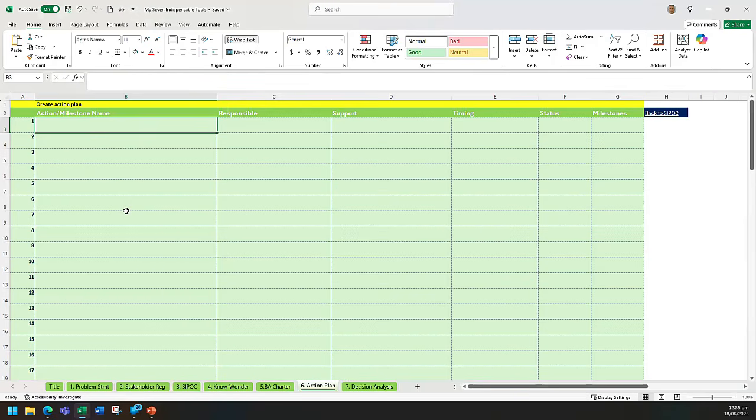And then if you nail that for every piece of work within your project, and get it down onto something like this and track it, then you're chasing people, you're closing loops, which is another thing, closing the loop. A project manager told me years ago, "Greg, has someone such and such done that?" "Yeah, no, they said they were going to do it." And he says, "No, that's not what I asked you. Have they done it? Close the loop." And I rang them and they're like, "Oh, crikey, I forgot about that." And so that's really stuck with me.